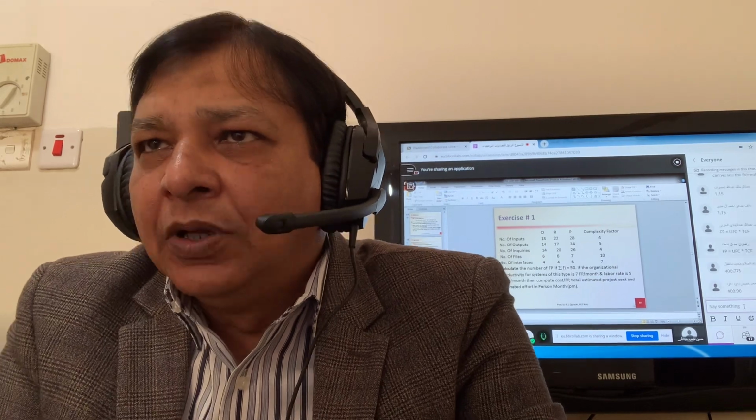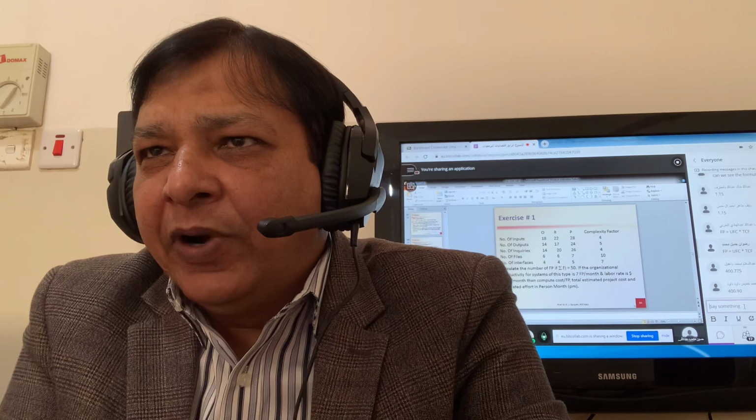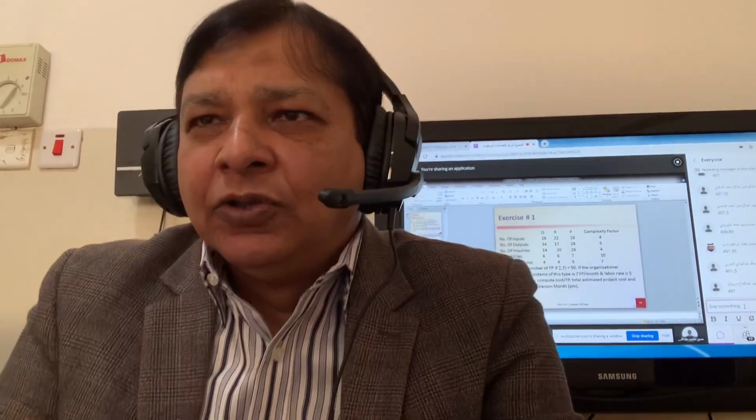The function point formula is FP equals UFC multiplied by TCF. You calculated UFC, now you multiply it with TCF, and you have the function point. UFC is approximately 349 and TCF is 1.15. So 349 multiplied by 1.15, FP is approximately 401.